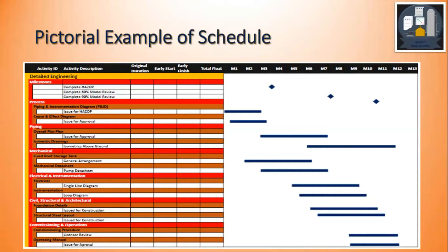Commissioning and operations may include commissioning procedures and operating manuals. Within those are the activities — for example, P&ID issued for HAZID, cause and effect issued for approval, plot plan issued for approval, foundation issued for construction, and so on. We also see milestones. The next level is the activity itself, and on the right side we see the durations of those activities. This is the pictorial example of the schedule.